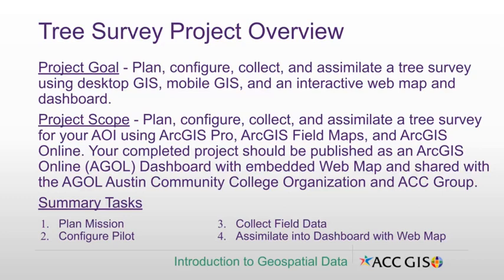There are four summary tasks for this project: one, plan the mission; two, configure the pilot; three, collect the field data; and four, assimilate the field data into a dashboard with a web map.